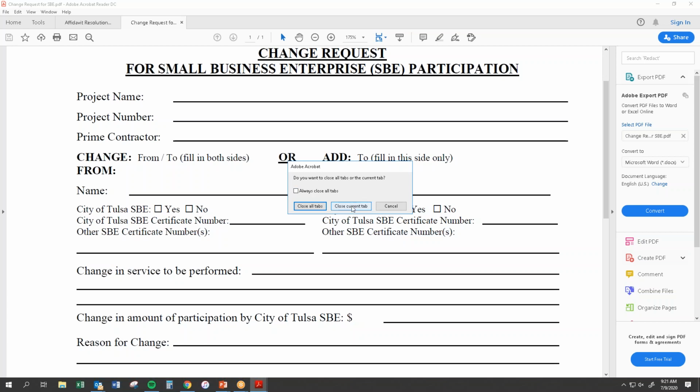May I add on to that, Rachel? Also, with these change request forms, we first must be into an executed contract before any changes can take place, and then we can move forward. Our prime's responsibility, as Rachel just mentioned, is to let the subcontractor know of the changes. If it's a decrease, we ask for the subcontractor to sign off on this.